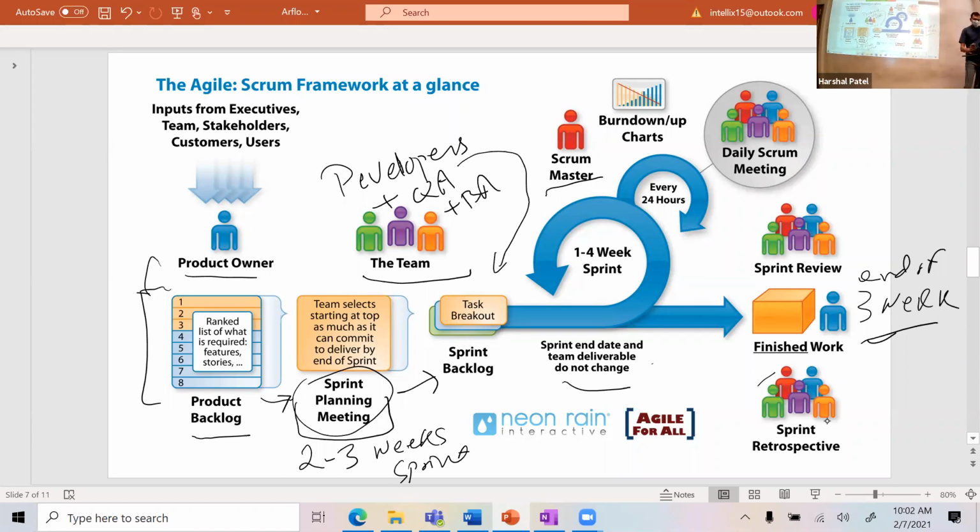So then who decides that small chunk? What is the important requirement and what is to be done? Here, the product owner works closely with the business. Typically, they prioritize with the business what is the most important for the business. So they will provide high priority items versus low priority. The team will look at only the high priority items and start pulling only those. Once, at the end of the sprint, they no longer have high priority items in the backlog, they'll start looking at the medium and so forth. But the product owner is typically responsible for identifying that.